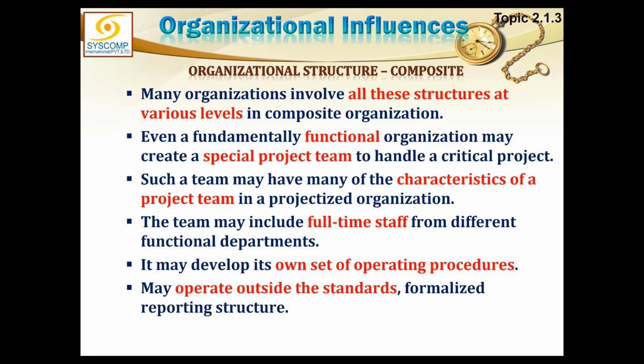But won't you feel that in a projectized organization there will be a lot of wastage of resources? Yes, because where the sharing could have been done, there is no sharing. People are sitting idle doing nothing, just on the payroll of the project. And moreover, because this is permanent staff, the project manager develops loyalties with them. They have got rapport. They start becoming part of a small little organization.